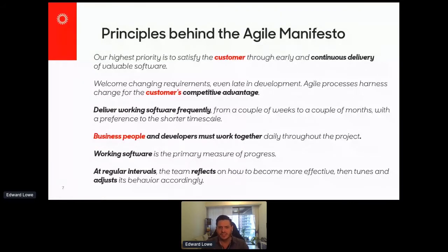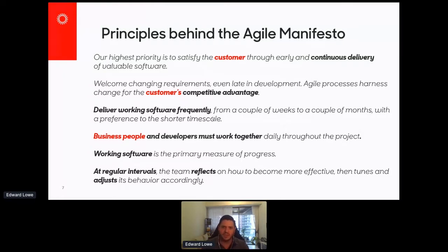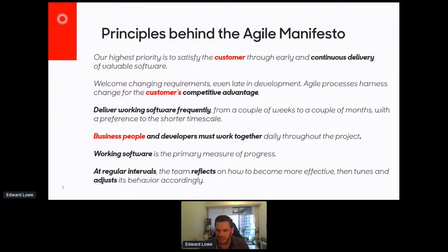I've taken six points here — six bullets from the principles of the Agile Manifesto — and what they're really talking about in many ways is the feedback loop. It talks about satisfying the customer through early and continuous delivery, delivering working software frequently — and 'working software' is an important phrase — where working software is the primary measure of progress. To me, working software means something a real user can actually use, even if it doesn't do very much. Sometimes we don't use that as the measure of progress; we look at check-ins or Jira tickets instead.